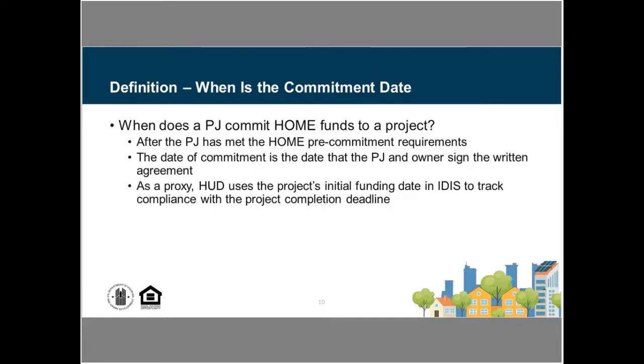And we can't really have a fully executed commitment of funds reflected in that written agreement until all those steps have been taken. So once that written agreement has been fully executed, you are then able to go into IDIS, and you're going to be certifying that this project meets the requirements of a commitment. So really the trigger here is meeting the requirements and having executed that written agreement in place.